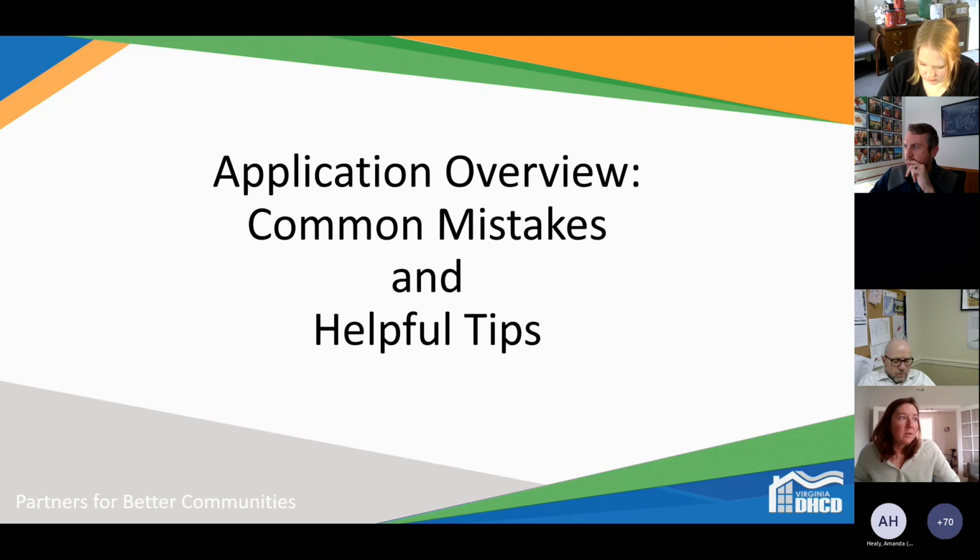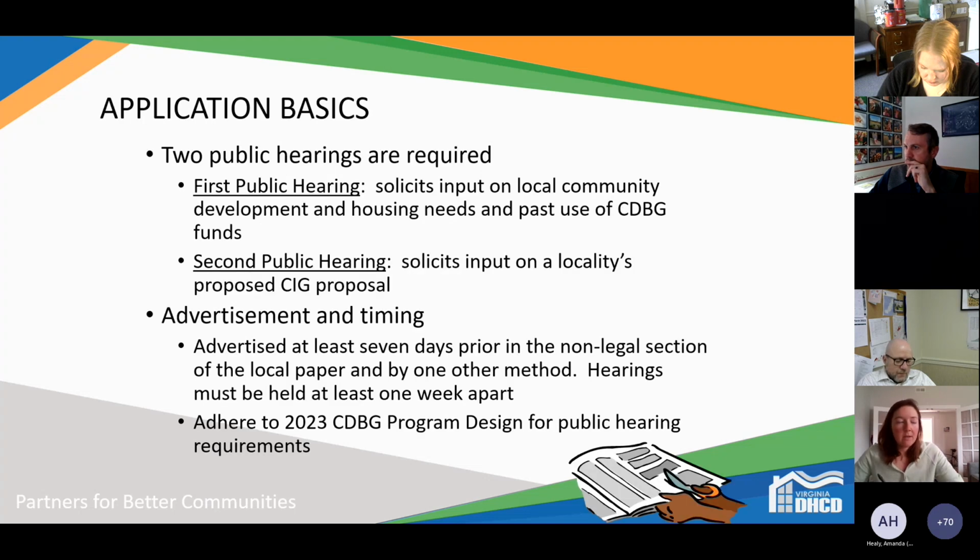So now we're going to go into some helpful tips and common mistakes that we see pretty much every year. This slide is about the public hearings. Two are required. They have to be advertised at least 7 days prior and held at least 7 days apart.